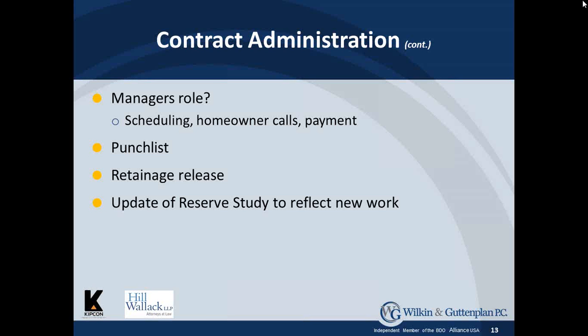The next is punch list. Again, I relate that back to the retainage. If you're holding back money from the contractor, there's a punch list that's developed during the course of the job, and the retainage is released when the punch list work is done.